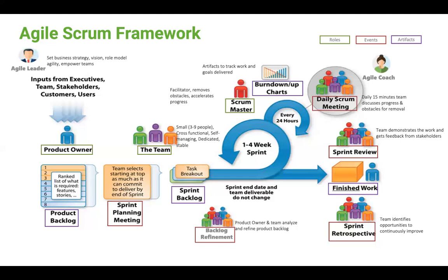Now, it's when you have finished your planning, at the planning, the team commits itself to say, we're going to deliver XYZ amount of story points for the next 2 weeks. And when we say XY amount of story points, it means we'll deliver this story, we'll deliver this, we'll deliver it, based on the product owner's priority. Okay? Does that make sense? Yes, it makes sense.